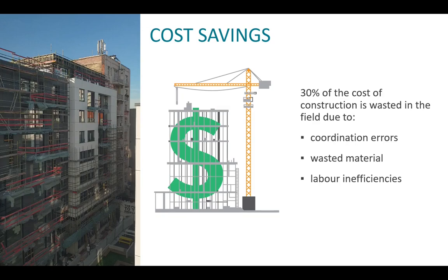So if there are design changes that aren't coordinated between the different stakeholders, materials for those design changes may not be needed anymore. So the materials for the wall, if you get rid of the wall, obviously you don't need those materials. Or if the designs change, you maybe need less or maybe need more. So you can end up wasting time and wasting materials. And again, this all adds to cost.